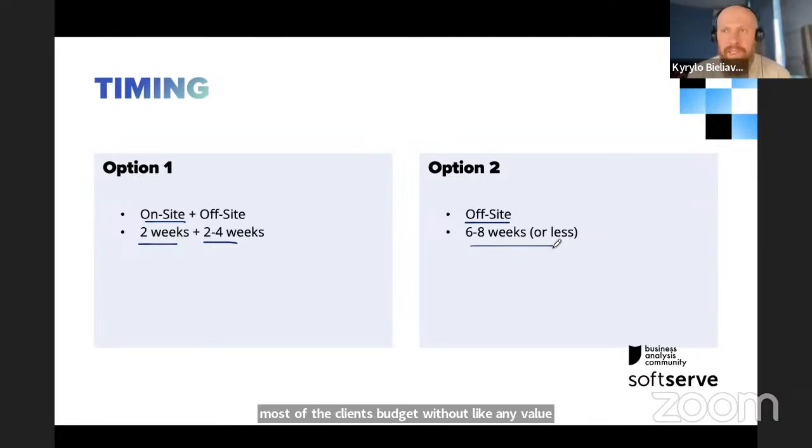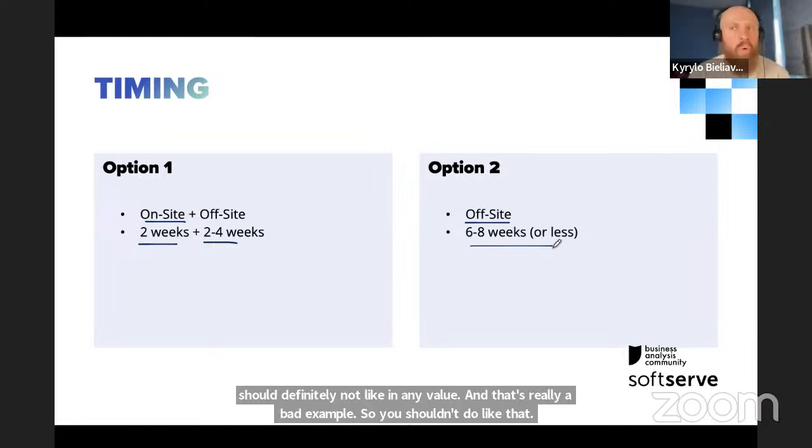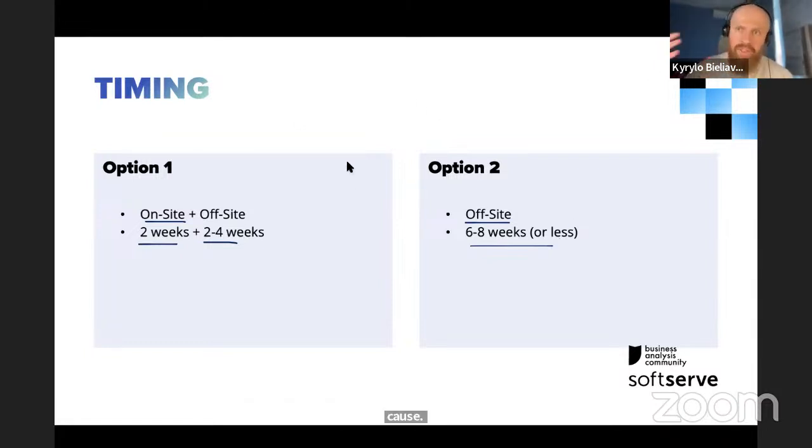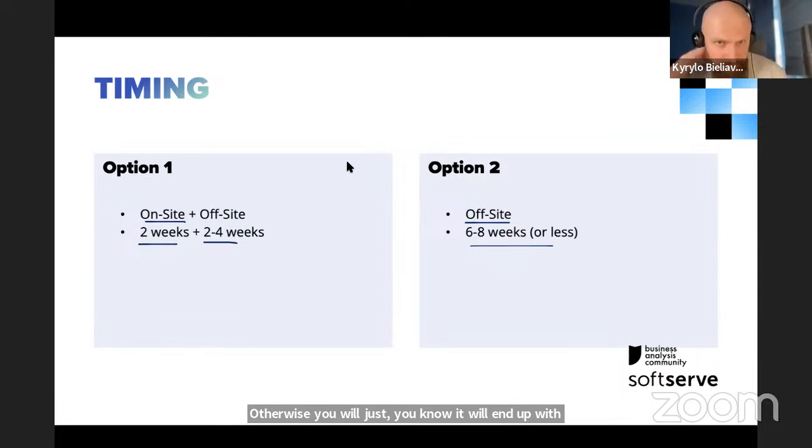You should definitely limit the discovery stage in time, and agree that after that we make a decision. Either we start the development, or we just stop, because otherwise it will end up with spending the client's budget on just discovering stuff.